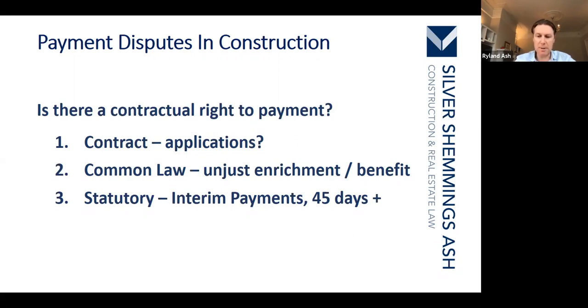But the interesting point, I think, is that it's still good law in England and Wales that a party only gets paid for work, construction work, once that work is complete. That goes back to the 19th century and the principle that a person has to complete the works before they're entitled to be paid, unless there's been an agreement otherwise. And in some cases, of course, there aren't.